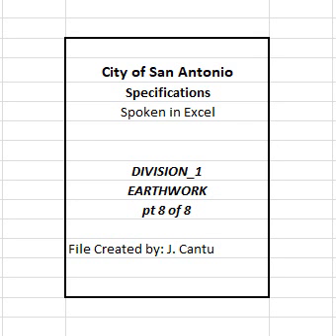Scales must conform to the requirements of TxDOT Item 520, Weighing and Measuring Equipment. When cement is furnished in bags, indicate the manufacturer's certified weight. Bags varying more than 5% from that weight may be rejected. The average weight of bags in any shipment, as determined by weighing 10 bags taken at random, must be at least the manufacturer's certified weight.